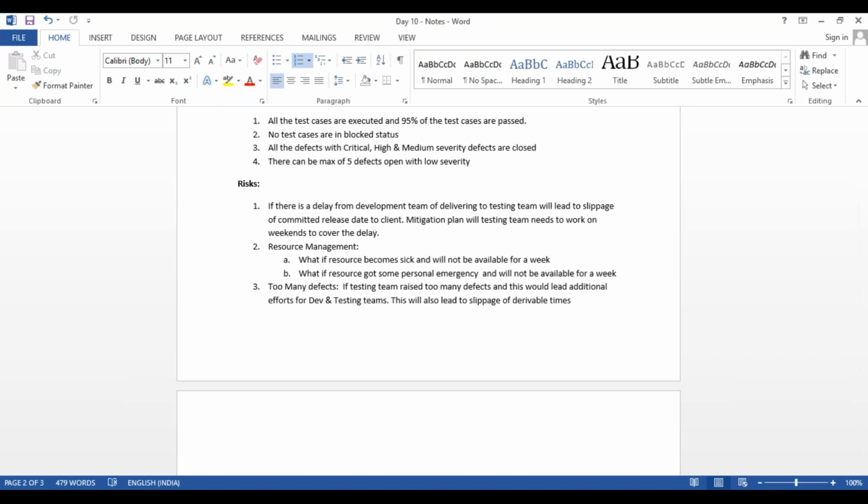So when I'm saying I need 3 months, I generally expect October 1st is the time when I should get my system for the testing team, so that I can spend 3 months, October, November, and December, and I committed to the client that on December 31st we are delivering your system to UAT.